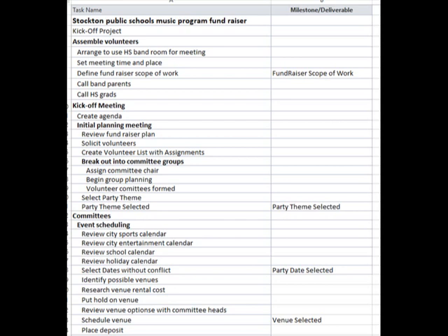A graphical work breakdown structure gives us a more high-level view of the project. So if we're doing top-down planning, it's a good way to graphically capture what we have to do. But I find that the graphical work breakdown structure can be too high level. I need to create a list work breakdown structure, as I have here, to be able to appropriately identify the work.